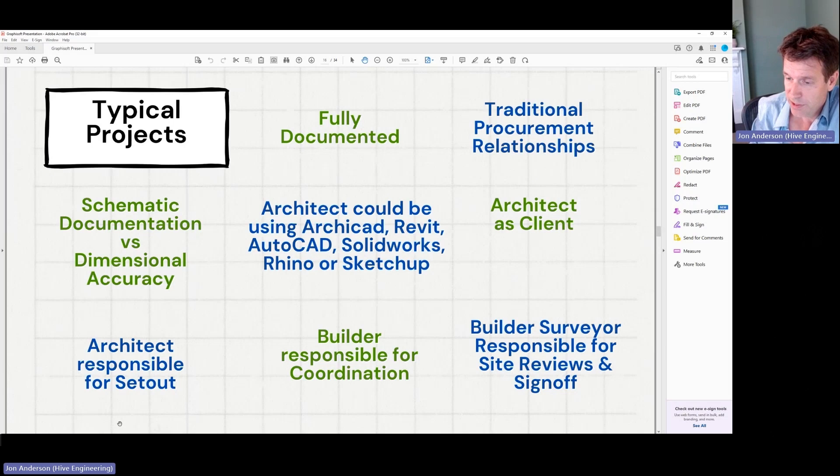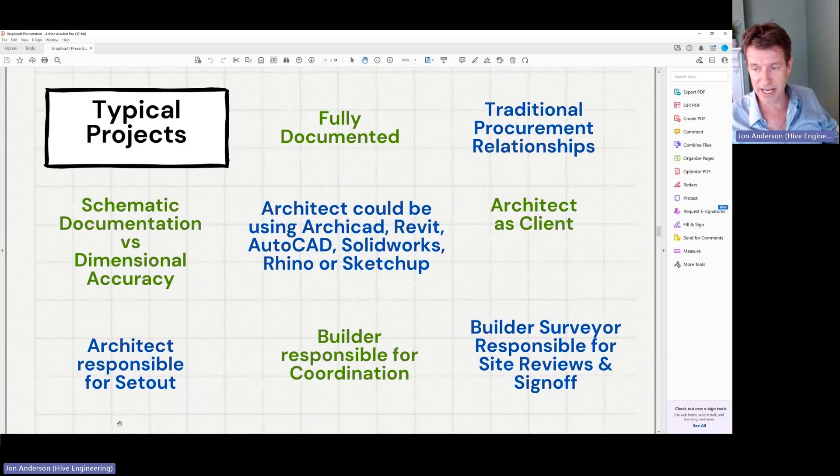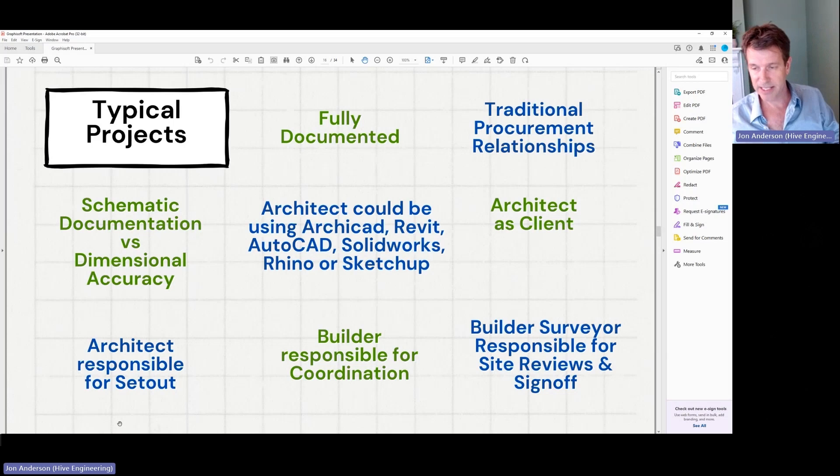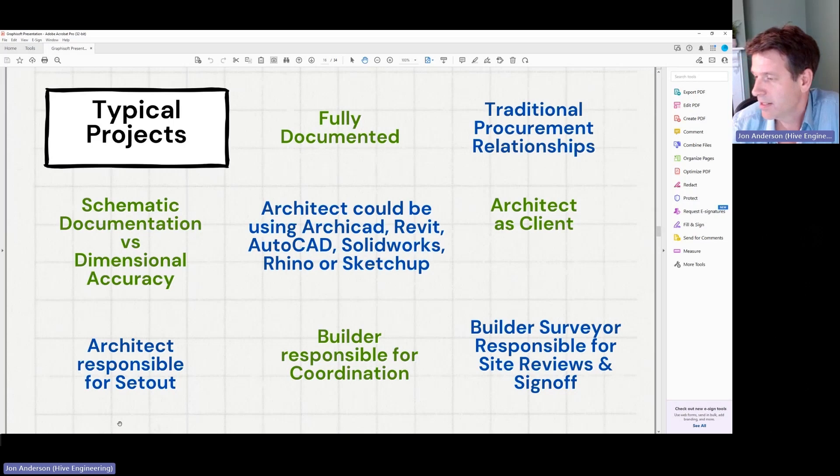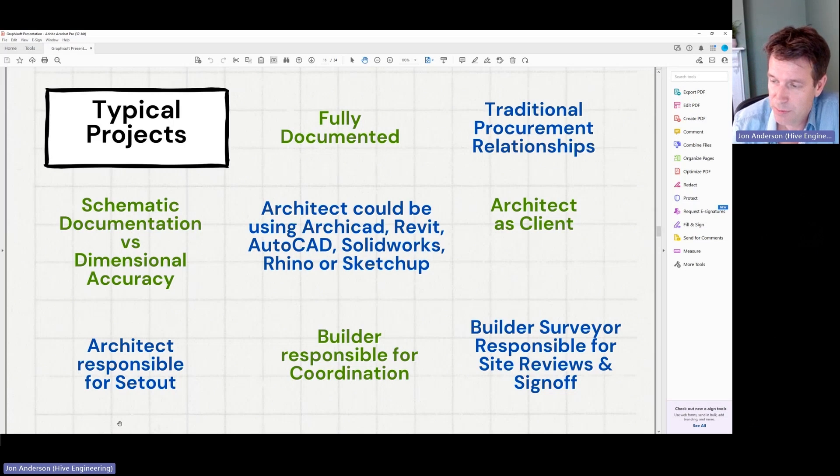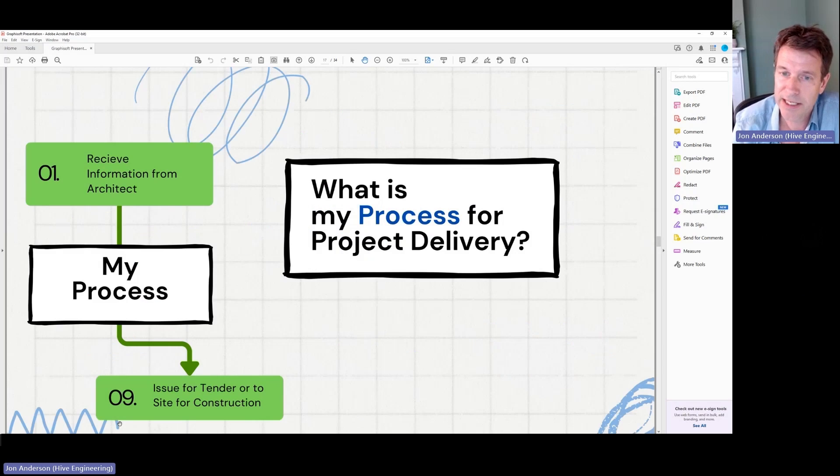The builder is obviously responsible for the final coordination of the project. So they will take our drawings, the architects and the engineers, and create shop drawings and all the fabrication from that. And then the building surveyor is responsible for the site sign-off. So that's typically the way projects operate.